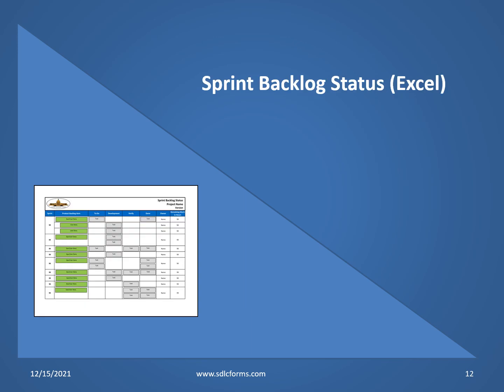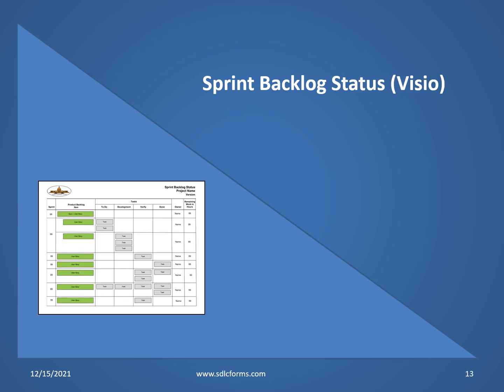Generally, the sprint backlog status, as an output of the sprint planning and meeting schedule, defines the work that remains on the project. The sprint backlog contains many things not identified on the product backlog, including specific tasks that have been decomposed from the accepted user stories.